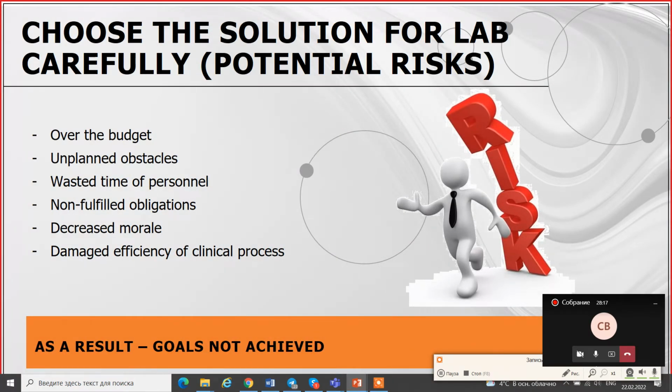And about the risks. Well, time for scary movies. When you speak about expensive things, you understand quite well that expensive things can be broken. For instance, if the contractor connects your very expensive PCR analyzer or something like TrackLine and burns down, for example, the COM port for it. The COM port for one of the top world vendors, I will not name it, can cost you something like 4,000 euros each. And what's more scary, it can be just out of stock. So the next supply will be coming from Germany in 4 weeks, for example. And in 4 weeks, your hematology analyzer will be completely useless.